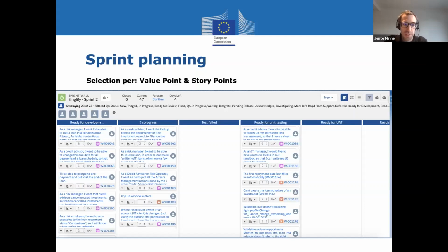And what's interesting, why don't they normally put real time on it, but more story points? It's because in the beginning, if the system is complex, it will be difficult to estimate how much time people will work on a certain user story. And so they will give more relative values. They will say story points. And little by little, if you work a lot with the team, you will understand how many story points you can do in one sprint. And then you get better, more detailed estimations of how much time your development team will work on your next sprint. Normally sprints always remain the same length. So you're not going to do one sprint of 1 week, then of 2 weeks, but you will know how many user stories you can add into one sprint.